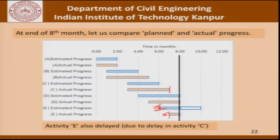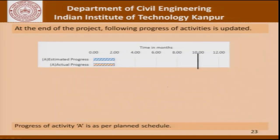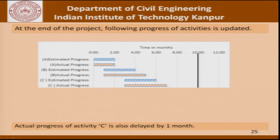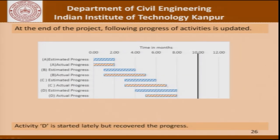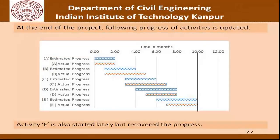Taking this illustrative example to its logical conclusion at the end of month 10, we find that even activity E, which was showing a lag at month 8, has also been completed in time. Instead of taking 4 months, this activity was completed in 3 months by using additional resources.